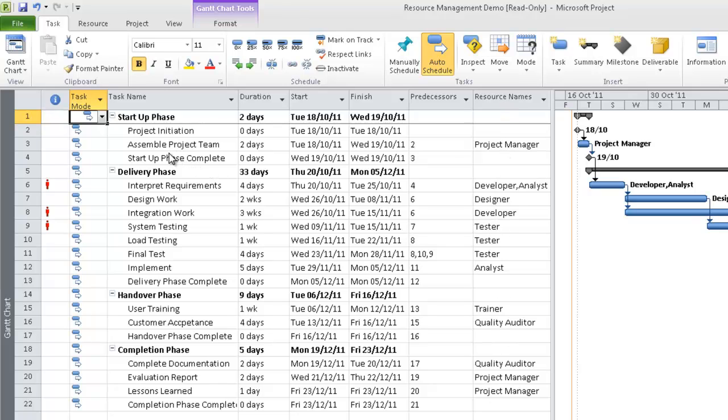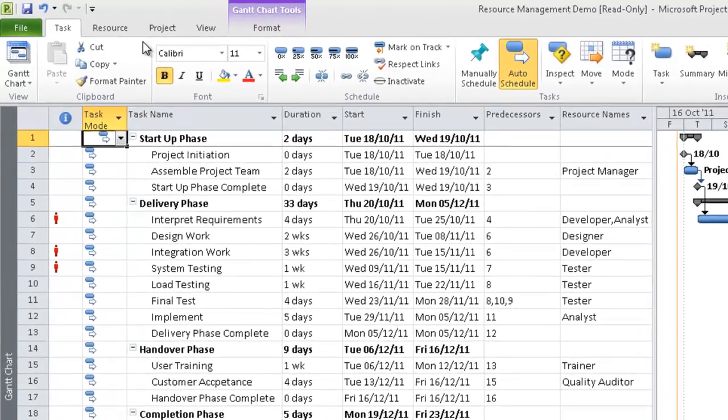Now we have a project opened up in Microsoft Project Professional 2010. Here I see a list of all my tasks, duration, start and finish dates, and importantly on the resource names, we see a list of generic resources. To assemble the project team, we need a project manager, a designer for design work, and a developer for integration work.